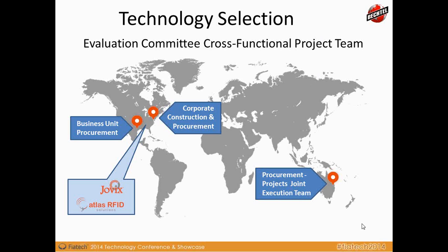So rather than have distinct EPC teams on each one, we took the P out of the EPC and made that a joint effort across the 3 projects, so that we could build in some economies of scale. Again, just to make the point that it's not solely a technology discussion. The whole purpose of applying the technology was predicated upon some business decisions that were made to streamline the overall procurement activity to the Curtis Island location.